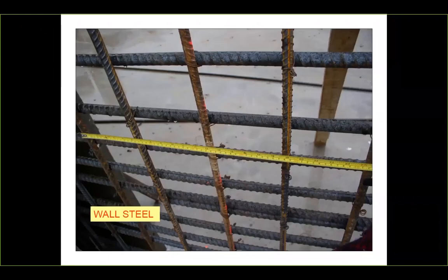Verifying rebar, your tape measure on site, in hand, with your camera, you can take pictures to verify, to document that, hey, the rebar was indeed placed. Depending on the structure, they were actually placed where they needed to be placed. If you're doing a liquid containment concrete structure, you're going to have a tighter space in rebar, the bottom third, and as you move up, it can be spaced differently. Well, just verify, document that, hey, this stuff was actually done. And if there was an issue, was it with the concrete, was it with the rebar, or was it with just poor workmanship after the fact?